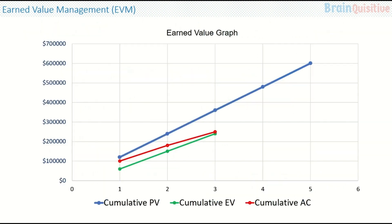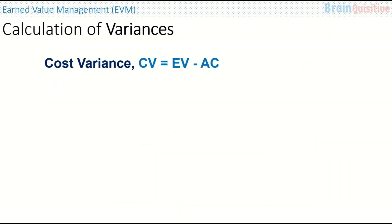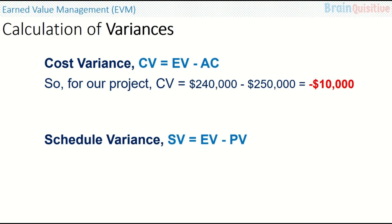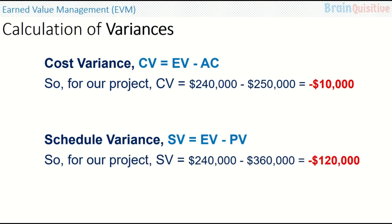This is the earned value graph of this sample project. The blue line is the cumulative planned value, the green line is the cumulative earned value, and the red line is the cumulative actual cost. The cost variance, or CV, equals earned value minus actual cost — so for our project, CV is minus 10,000 dollars. The schedule variance, or SV, equals EV minus PV — in this case, SV is minus 120,000 dollars.